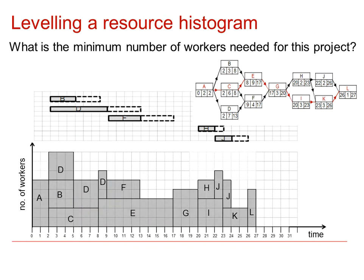Another question we might answer is: what's the minimum number of workers required for a project, assuming that it's going to finish on time? The way we drew our resource levelling diagram to start off with had a maximum number of workers of 8. But we've got the possibility of moving some of the activities to see if we can reduce it. The first point we could look at is at the end, where if we move J into a single block, we've now reduced that to 5 workers. So can we actually get down to 5 workers in the first part?